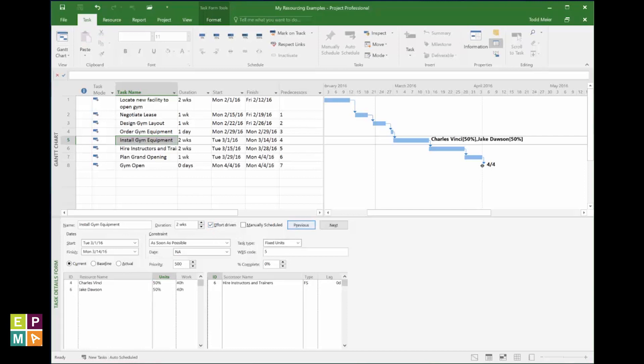Alright! Perfect! Now this needs to be done for all your tasks, unless they're summary tasks or milestone tasks. Never assign a resource to those sorts of tasks.